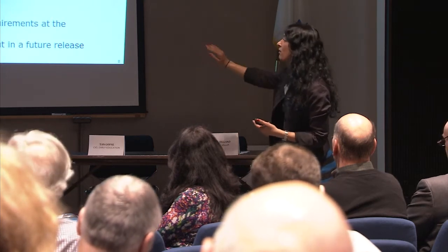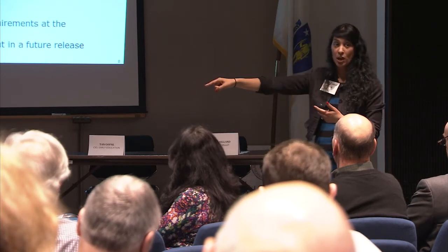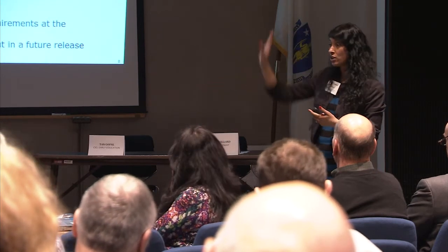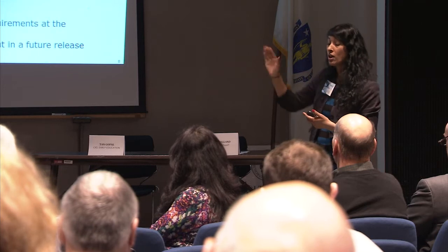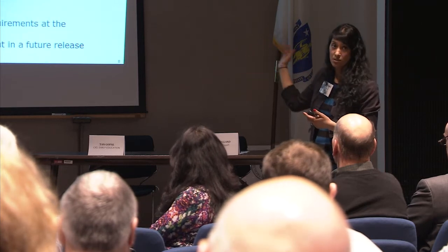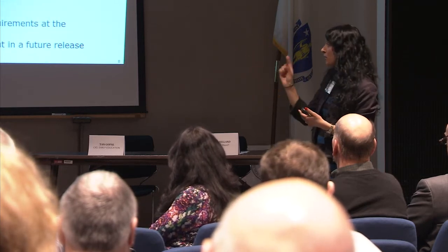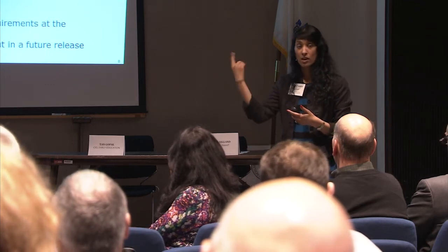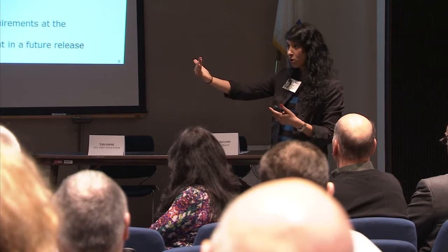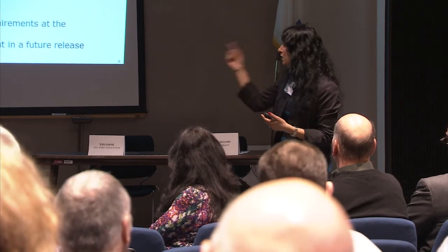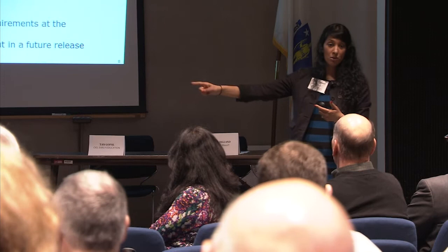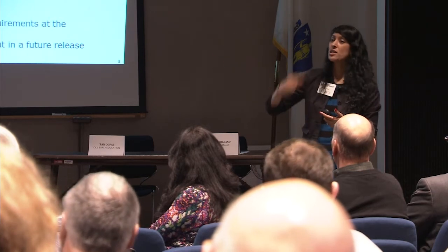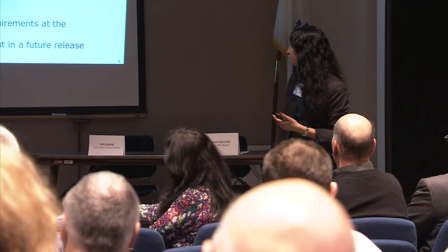Change management, you have a lot more flexibility at the beginning of the project. Because you can always say, here's our backlog, we're going to talk about it in sprint 3 or 5 or 6 or 7. When you get to the release of the final product, you can say, this is great, we're on release 1, so we've got all your core items that you need to function. Let's put these extra things that are coming now into a release 2, a release 3, and we'll just keep making the software better and better.